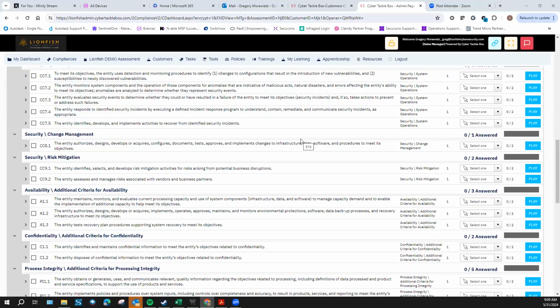Then you're going to have a change control plan. You're also going to have a plan that includes a back out. So if the change doesn't work, you're going to back out of that change, and you're going to plan out how you're going to back out of it. You're going to want to go through all these different change control items, like testing, approval, implementation, and all that should be in your document.